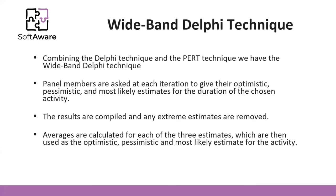Another technique is the Wideband Delphi technique, which combines the Delphi technique and the PERT technique. In each round, each participant uses the PERT technique to make their estimation. Three rounds are conducted, and at the end, the average of the third-round estimations is used as the final duration estimate.